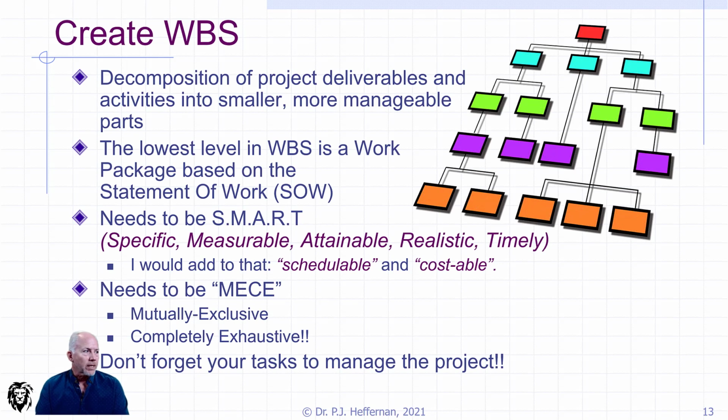So creating a work breakdown structure, remember it's a decomposition of project deliverables and activities into smaller, more manageable parts. Again, we mentioned earlier that it should be, or typically is, done in a tree structure. The lowest level in the work breakdown structure, the orange in the graphic on this slide, is the work packages based on the statement of work. If we can get to the bottom and do all of the orange level activities, then our project is going to be finished.